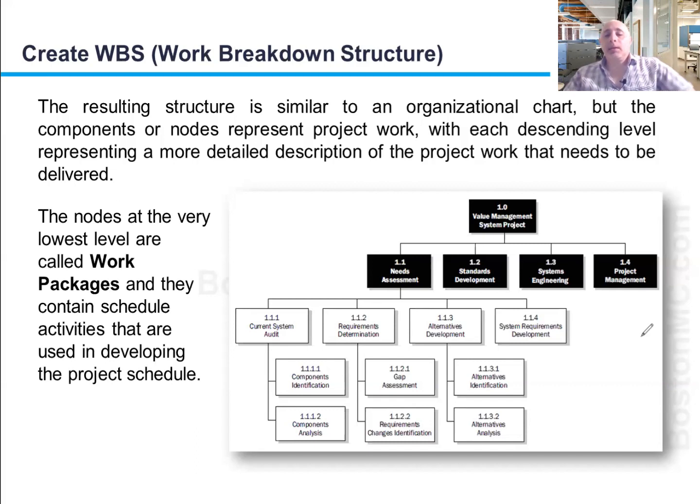So let's say this is our WBS, and let's assume we were building a tower and we know at some point we have to do landscaping after the tower is completed, so the outside of it. And we thought that it would be helpful to put, let's say we want to put $100,000 on the side. So we put $100,000 here, and that $100,000 that we put on the side is going to be used for the landscaping. Forget that it says project management. Let's say that's the landscaping outside, right? This is going to be called a control account. It's a $100,000 control account that we are going to use for landscaping.